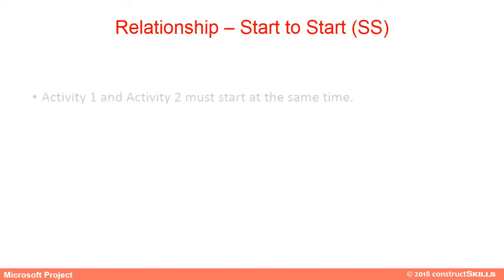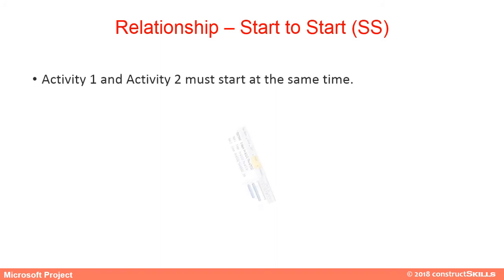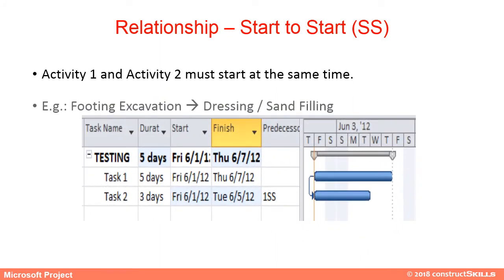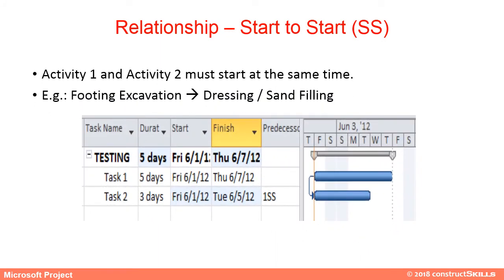Start to Start: Activity 1 and Activity 2 must start at the same time. An example is the relationship between footing excavation and pit dressing sand filling.